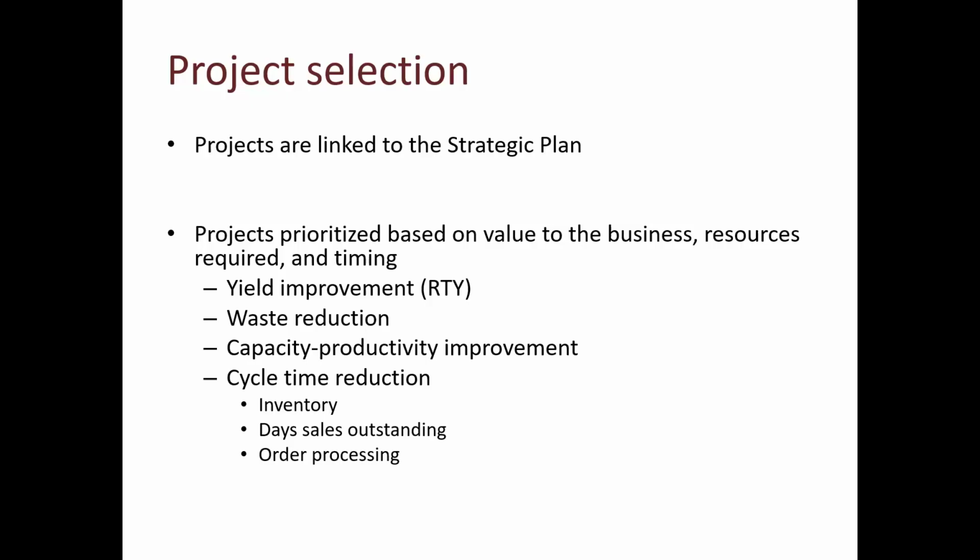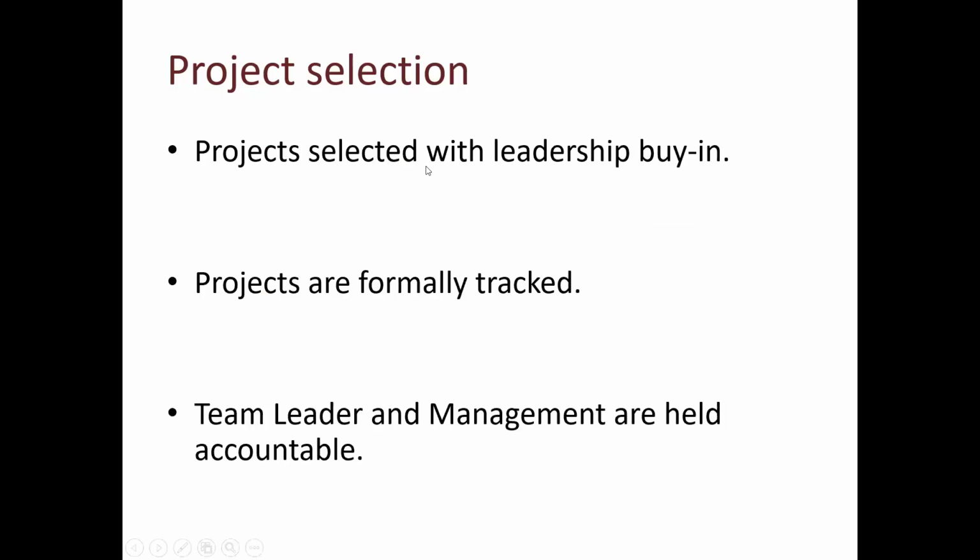Sometimes no. They will give you five KPIs not achieving their target, and you need to do some prioritization for them. So if they agreed on a specific project, and this is the most critical one, we start with it, boom, thank you. But what if the second scenario happened? That is, no, we have three to five, and you have to guide us on which one we should start off with. Here comes into play what we call project selection.